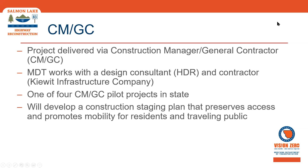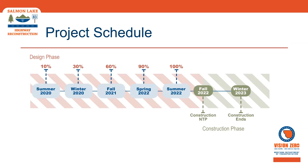We're going to take a quick look at the project schedule. At this point in time, we are early in the design phase and working towards a plan set that is about 30% complete by the end of this year. We'll continue working on plan development over about the next year and a half, with the intent to have final plans ready for construction in the fall of 2022. The bulk of the work is planned for the 2023 construction season, with some possible overflow into 2024.